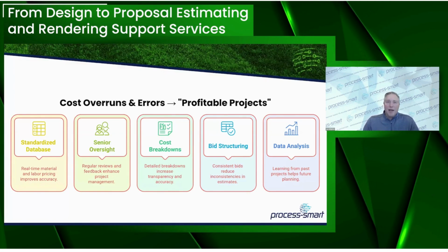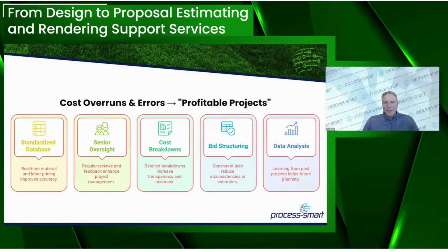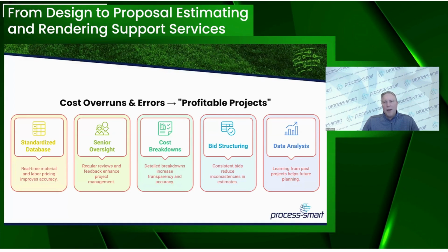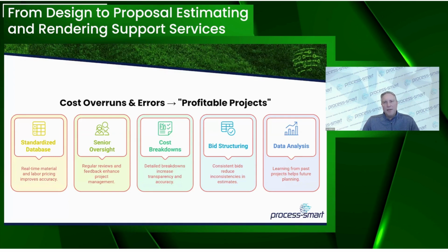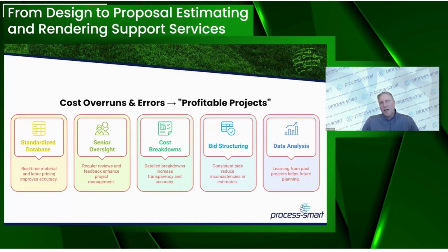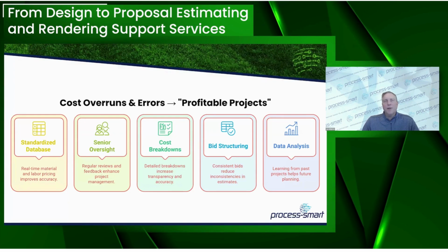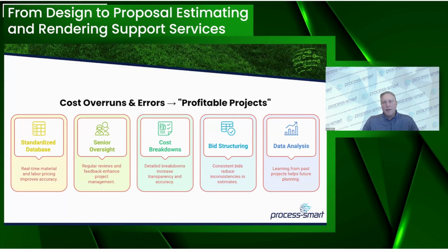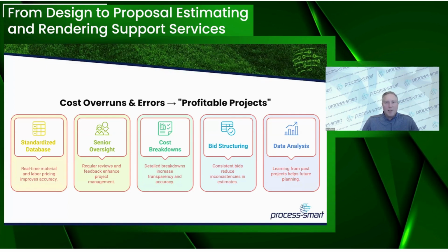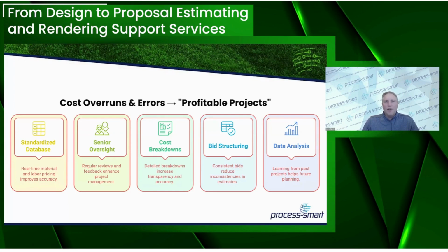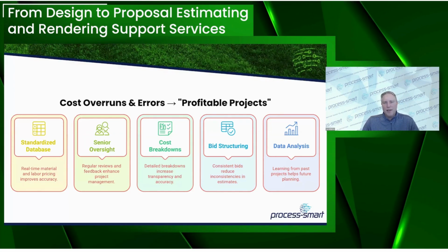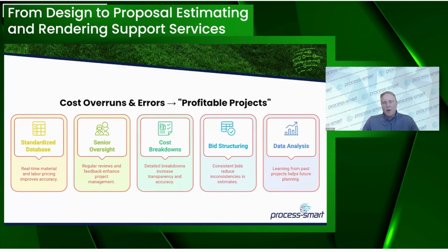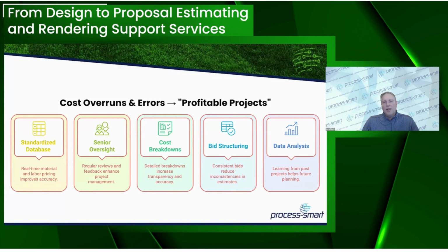And then for maintenance contracts, generally you want to wait till the off season and compare both your on season capacity, fertilizer usage, if you're doing trimming or annuals, and compare that to the estimate you gave the customer, so that when you do the next contract or the next RFP or the next renewal, you can really build that in. So that senior oversight and changing your approach is critical.